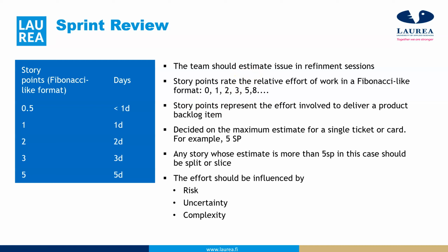So this is more of assuming that any work that you do in a whole day is 1 story point. If it's something you do in 2 days, that is a 2 story point. If it's something you do in 3 days, that is a 3 story point. If it's something you do in 5 days, that is 5 story points, and so forth. So that's how to estimate.